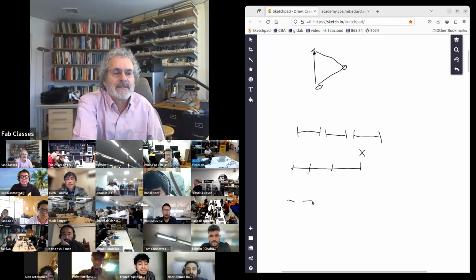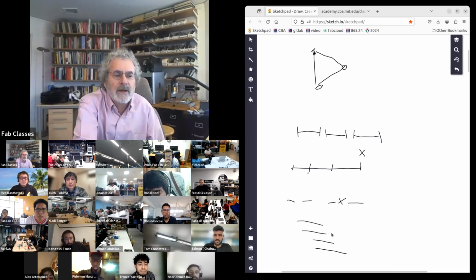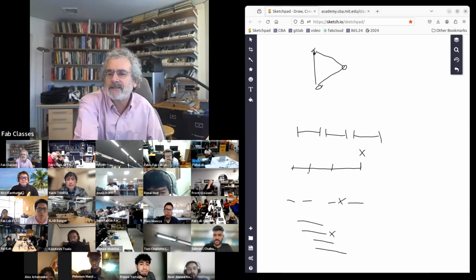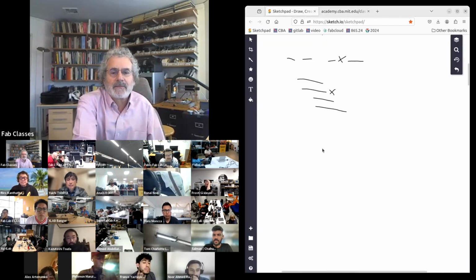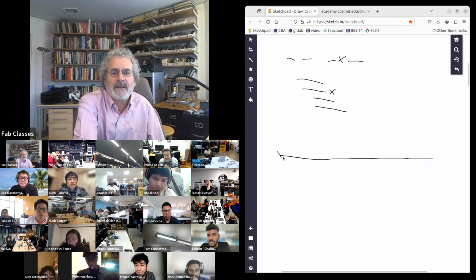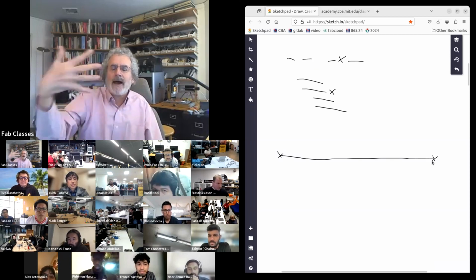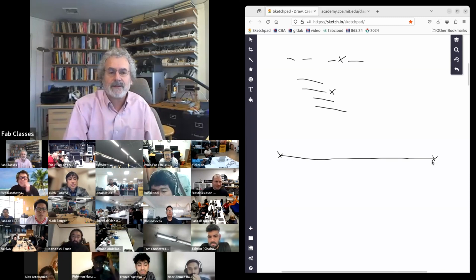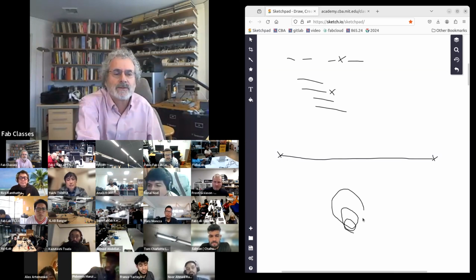Serial development is you do task, task, task, task, but if one task gets stuck, you block all the other ones. Parallel development is you keep all the tasks working in parallel, so no one task can block all the other tasks. Spiral development, you're going to get tired of me saying it. Straight line development is you start at the beginning and you finish at the end. In the US, the Department of Defense would spend 10 years buying a system and discover it didn't work at the end. Spiral development is you work in a series of larger and larger spirals, but each time you come back with a system you can test.